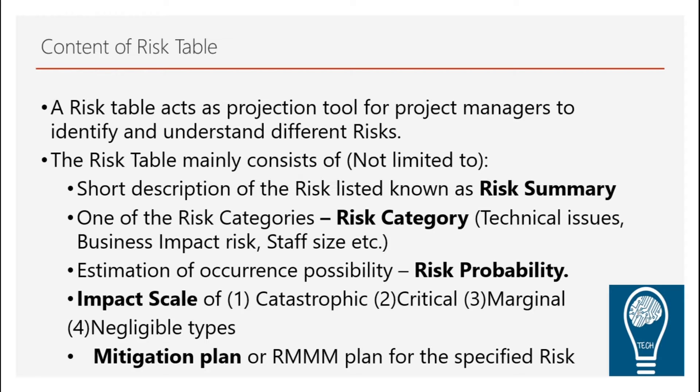We then add the impact scale. As seen in the last video, you can have high, low, or medium. The generalized version uses: catastrophic, critical, marginal, and negligible. Depending on what sort of impact the risk would have on your project development, you classify them into these categories. Finally, you define the mitigation plan — what you've planned to overcome that risk if that scenario occurs.